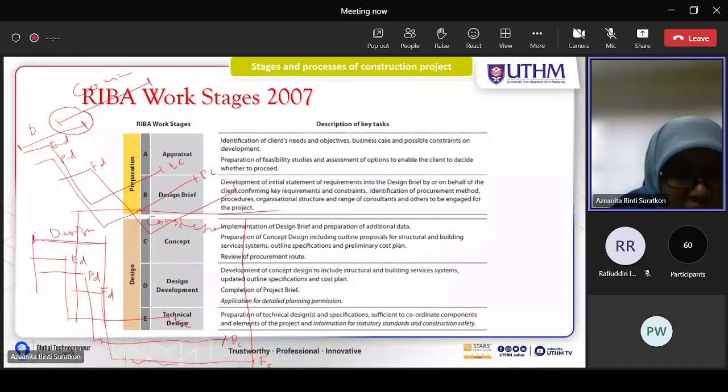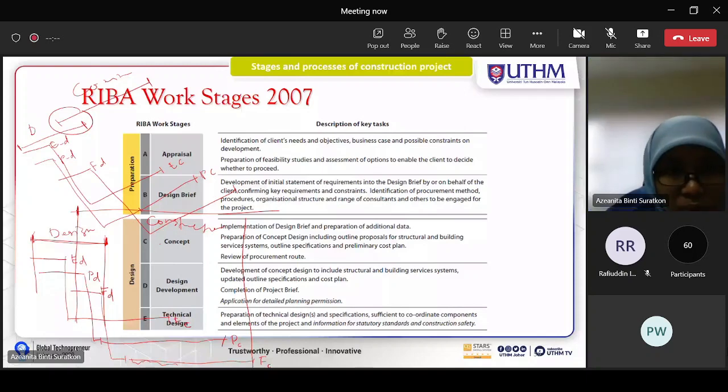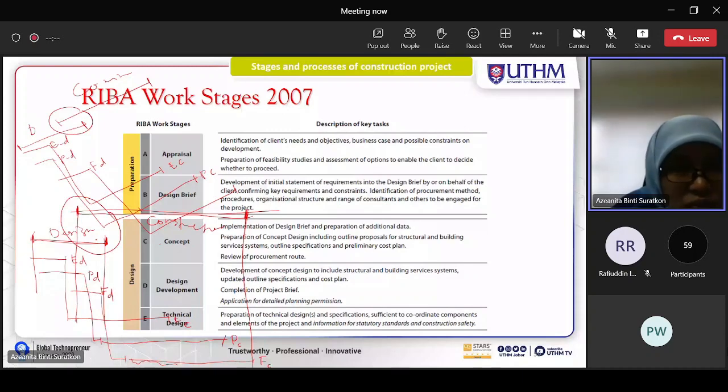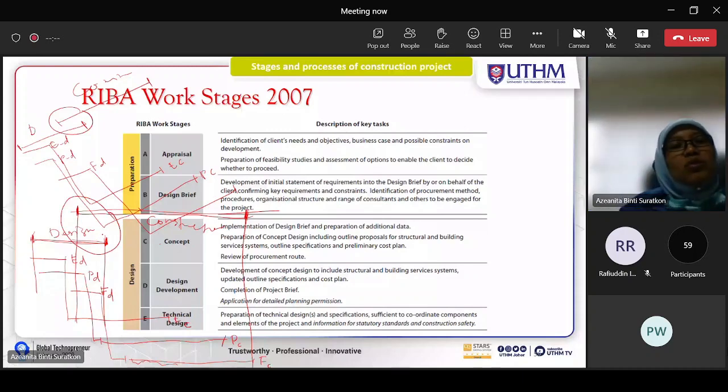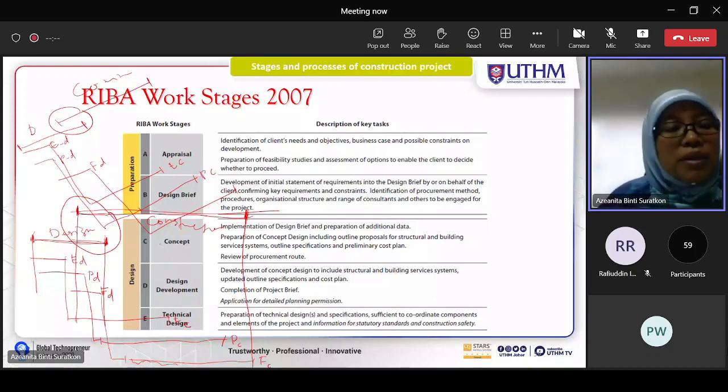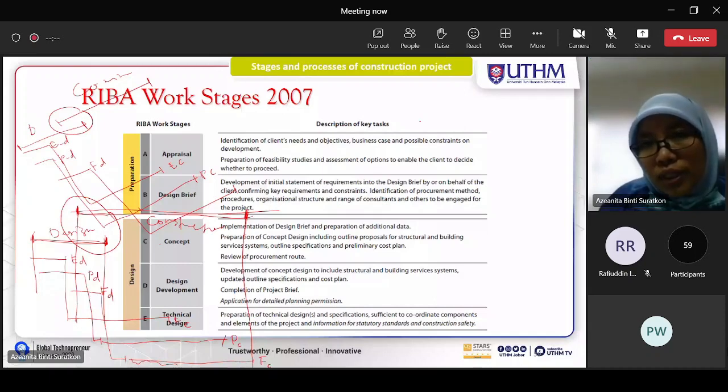This is the beginning of the design, and this is road furniture completing the design for the whole project. The project starts construction with the earthwork, for example, here, and completes everything here. So this is the construction stage. This is the overlap, not duplication, the overlap of the design stage and the construction stage. This is where design and build can save time compared to traditional.